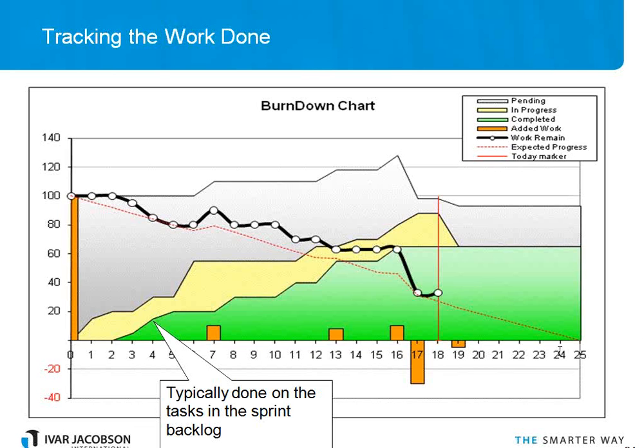You can see that we have about 30 days of work left to do, and given our projected performance, that should be okay. That should come in no problem. We've finished a lot of the stuff, about 60, and we've got enough to do. So what the graph is showing is a burn up in terms of completed and in progress work, the total target, which varies as work's added or removed, and the classic burn down over the top.